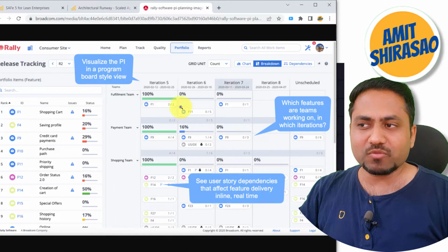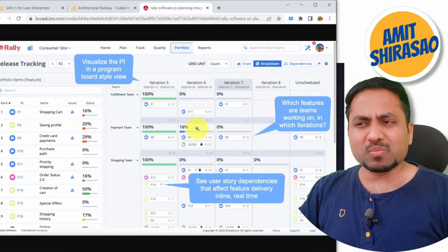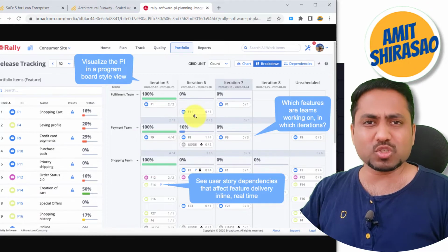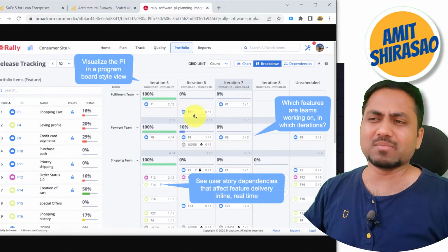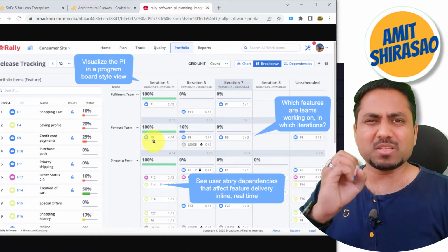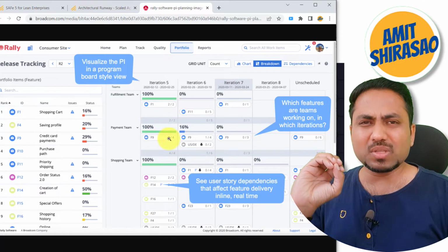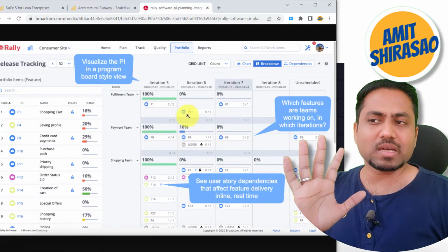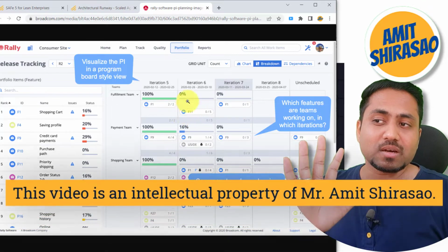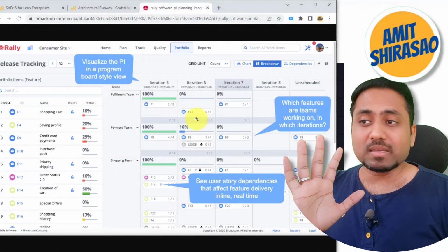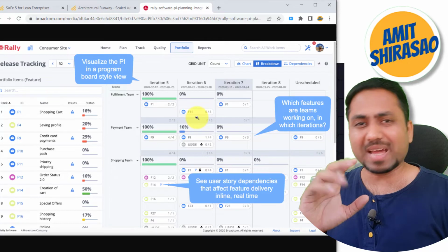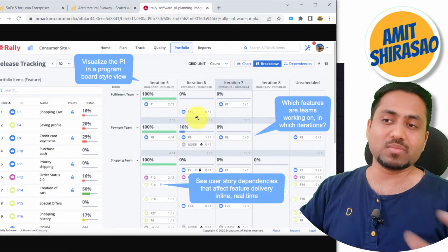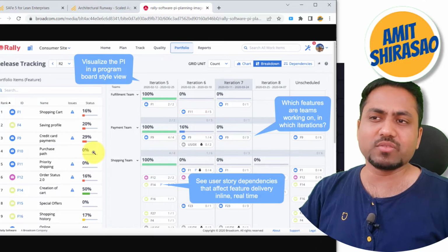Being the fulfillment team, I'll say, you pick those stories early which I require in feature 11. You pick those stories earlier and try to complete them, if possible, in the very first week itself. Otherwise, you should have done them at least by the end of this iteration. Then I'll be able to pick the dependent stories in the next iteration. That is what I'll request, and every other team can request every other team in a similar fashion, and finally one draft plan will be created.